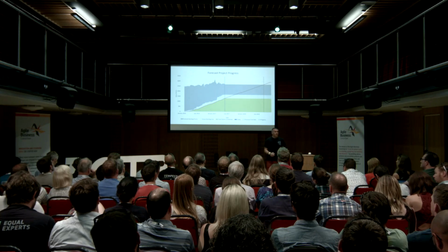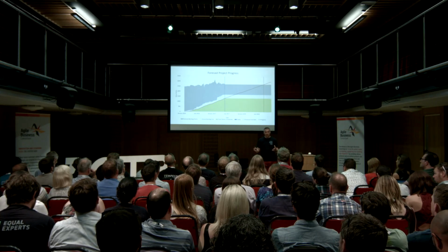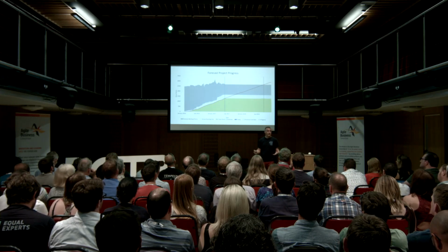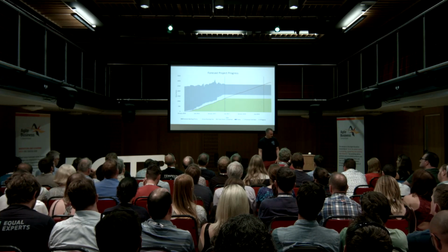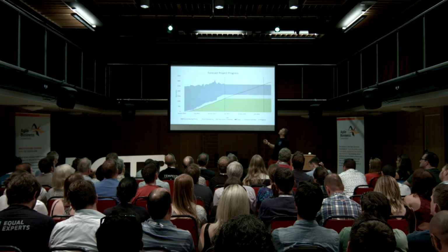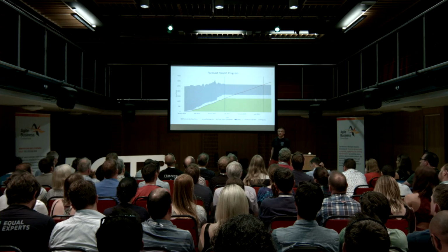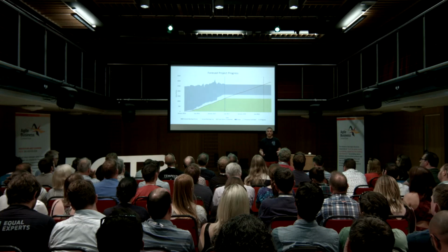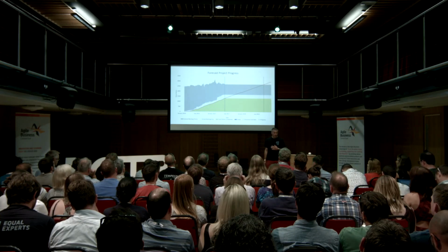And you would know that wasn't right. You would say, we're currently forecasting for August, but we know there's some stuff that we still need to break down. When we add this extra dark grey part in, you can see it pushes that line right out, so you can now see we're releasing quite a lot later. So it gives you a slightly better indicator of when you're actually likely to be releasing.